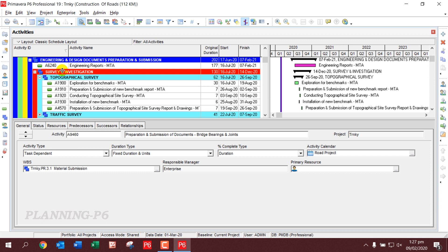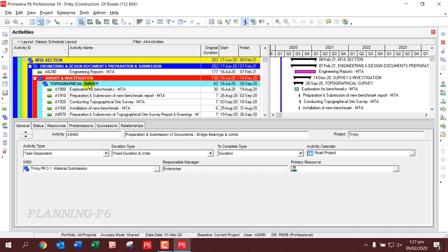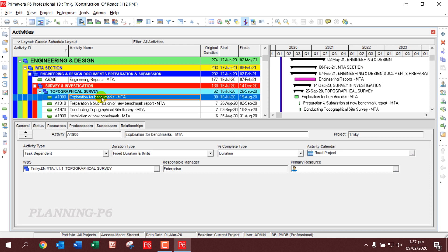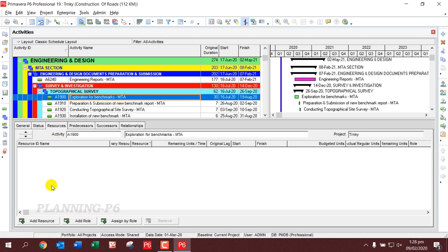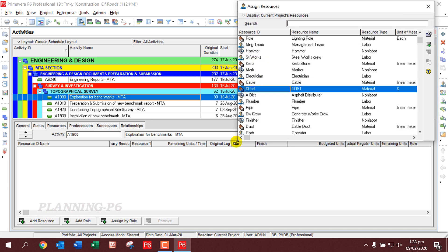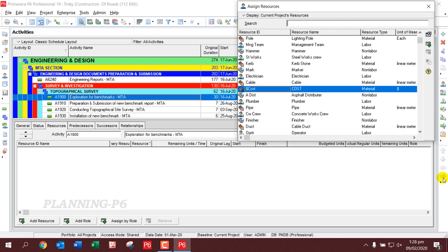There are two methods to assign resources to activities. The first method is to click on the activity you need to assign resources to, then go to the bottom panel and click on the Resource tab. Then click on Add Resources.